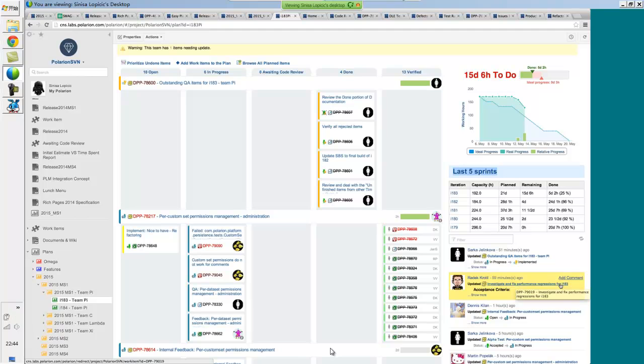To give you an idea of the size of the team, that may relate to our customers or how they do it, we found at least for us with that setup is around 4 to 5 developers per team and around 2 QAs. This gives us the most optimal way of a team working on a feature, and at the same time not stepping over each other or working on too many things, or sorry, too many people working on too little things, or the other way around.